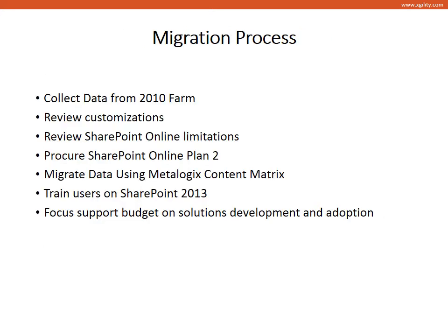So just a quick step-by-step of the project plan for this particular customer. Step 1 is to collect data from their 2010 farm. They said that they had no customizations and very few workflows. So the migration should be relatively easy, but we always want to check to make sure that the customer's perception of their own environment is correct.